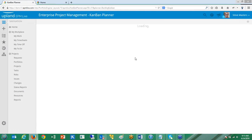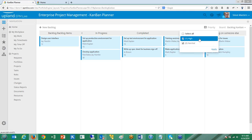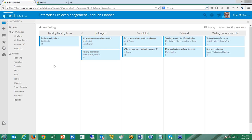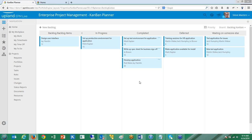You can use multiple different planners simultaneously. For example, I could use a Kanban board to track task statuses while still building a waterfall schedule. I can look at everybody's active work, filter by priority — say high or normal priority items — and then simply drag and drop. As people complete things, I can see where bottlenecks are. If there's a lot of work in progress, I know there's a problem. It's as simple as drag and drop: I meet with my team, we completed these three items, I drag them into completed, and it updates the status on the back end. When I go back into my full project schedule, the statuses will have been updated there as well.